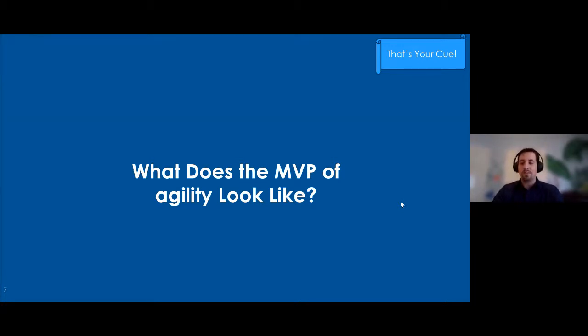Agile talks about what steps do I take? And so the first step you would think of in your broad plan, you would submit into an Agile process of this is the next step, our next experiment. How do I get something valuable out of that? And if your steps aren't set up like that, maybe turn it back where you have what in Toyota has been referred to as Hoshin Kanri. You take from the broad goals and bubble them down and then bubble them back up with feedback from the actual on the ground to provide modification on the plans. We still take the goal, but we produce a new path to get there that provides us value in the meantime.